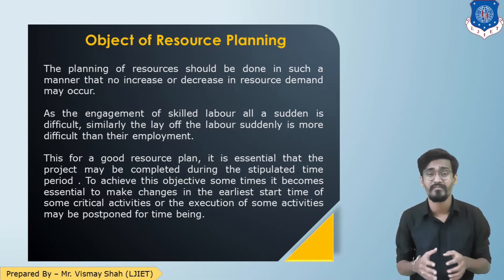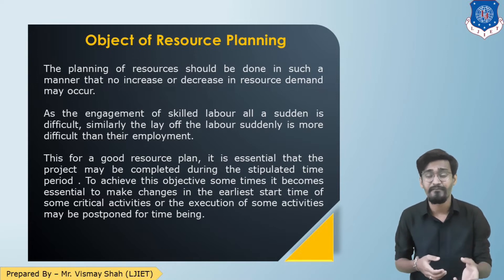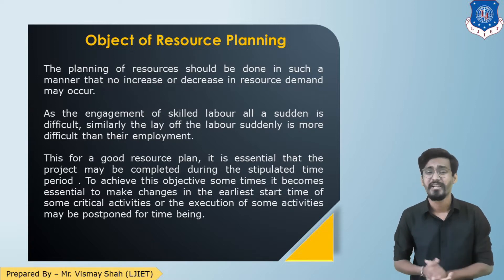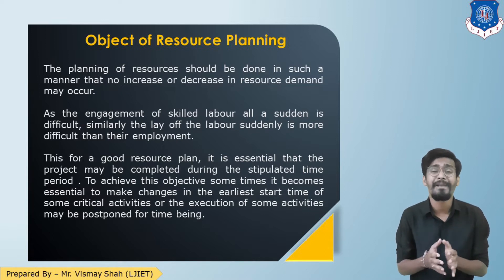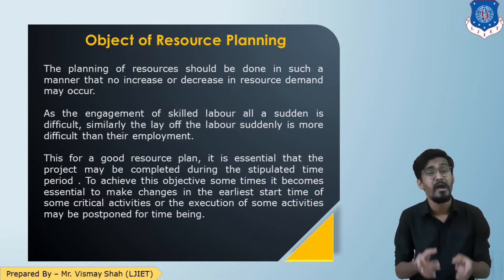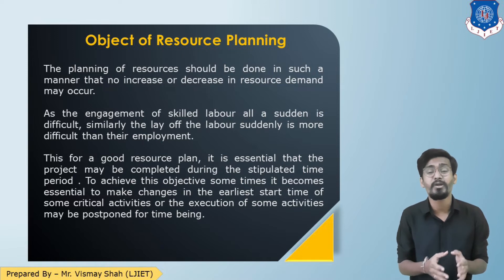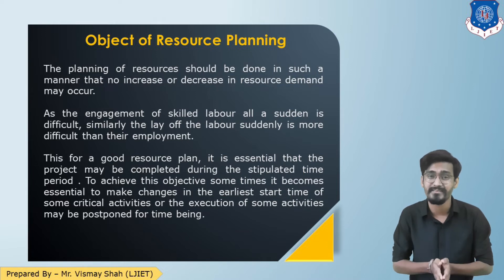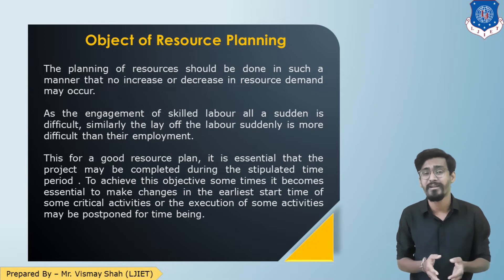Hence, the planning of resources should be done in such a manner that there should not be sudden increases and decreases in the demand for resources. Engaging skilled labor is difficult; similarly, laying off labor suddenly is also difficult. So as a planner, our end objective is to complete the project within the limited resources and within the time — and to do so, sometimes we need to fluctuate the earliest start time or latest finish time of activities, or even postpone certain activities.